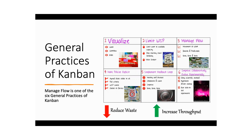The fourth general practice of Kanban is making policies explicit. You set explicit policies — that means you agree on certain rules that will move the work from one stage to another. For example, your definition of ready: when is your story or feature ready to move to the development queue? When will you call development complete? When will you start testing? These are all explicit policies.